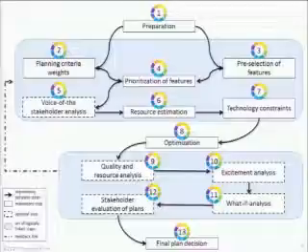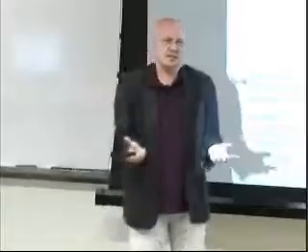And we need to look at the feedback of the stakeholders, how they judge these features. We need to have some resource estimation in place, and then we can do something which I will explain later, which is related to optimization, to really map this magic release planning problem into a quite rigorous optimization procedure. And once we have solutions, we are not yet done. On the contrary, the solutions now need to be validated. We have here something called excitement analysis. We do some what-if analysis. So we really check the applicability of the solutions, and we eventually might go back and change things.